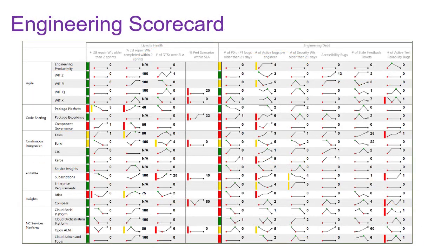This is a very good example, the Microsoft Engineering Scorecard, where they visualize the progress of their engineers. And again, they are not putting KPIs on the people. We usually put the KPIs on the automation, the pipeline, the tools and the work progress, but not on people. For example, they measure the time to build, the time for self-test, the time to deploy, the time to learn, but they don't measure the original estimation or the completed hours or team velocity or team capacity.